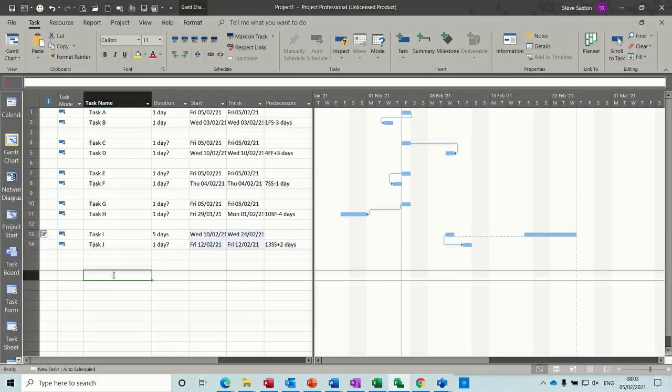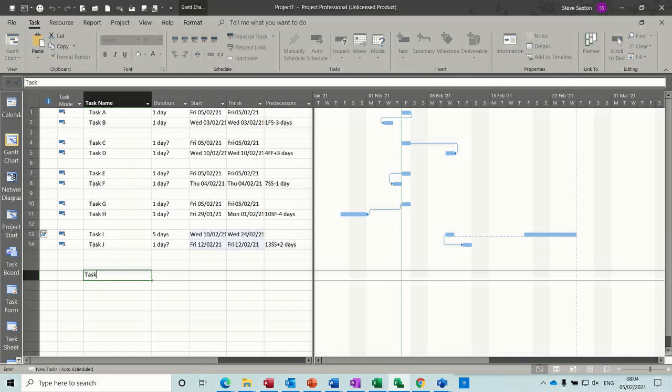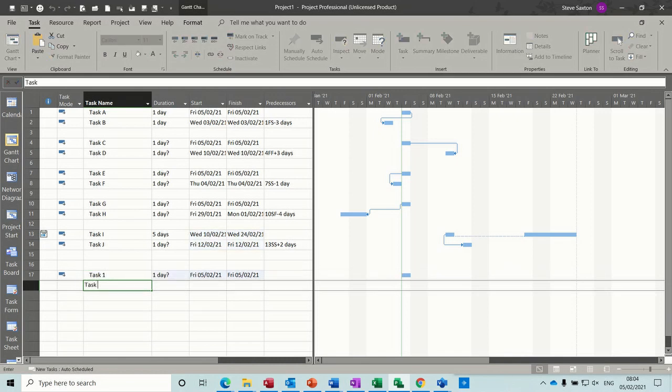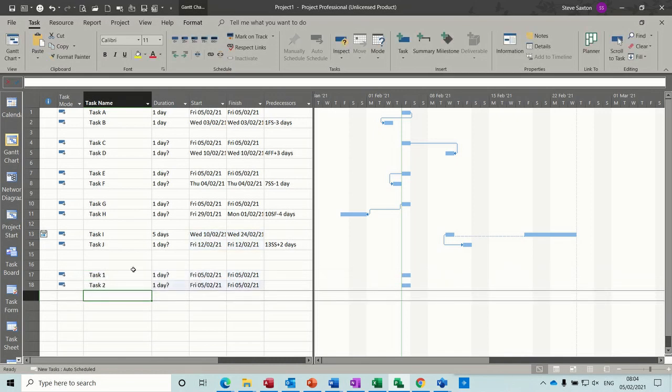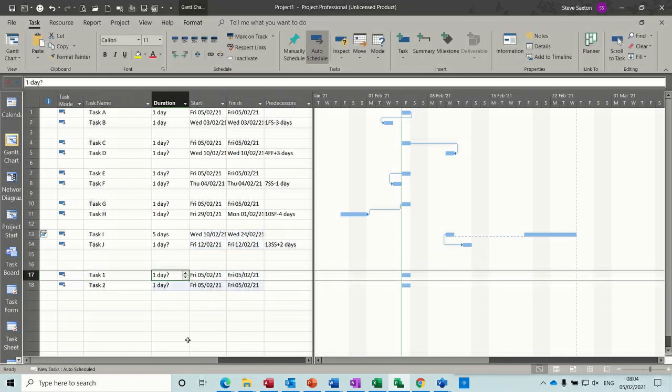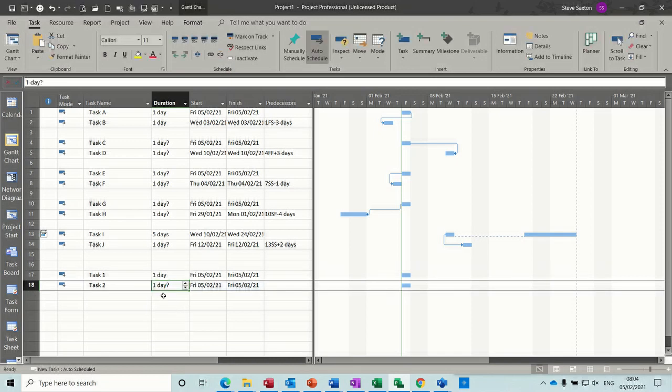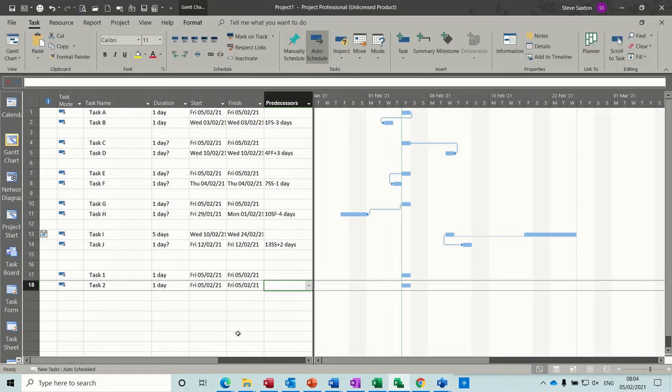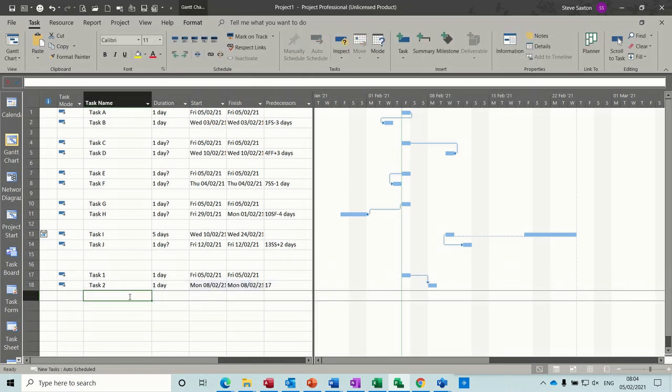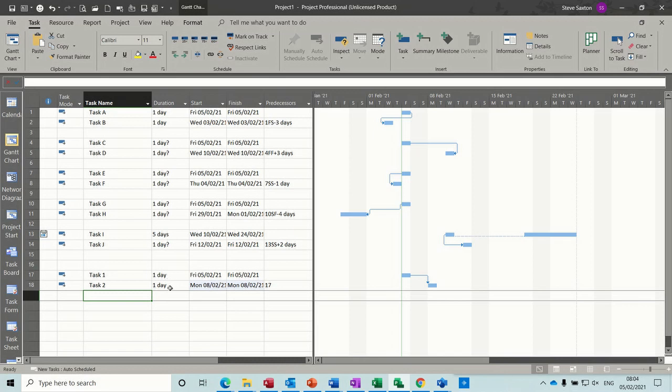Now there's a useful feature you can use lead or lag with, is to show a critical path. So sometimes, if I just go task 1, task 2, say you've got a one-day task, and then another one-day task. They're just following on. But what you need is a five-day drying time. So say that is pour wet concrete, and this one is to establish a building frame on that concrete. What you can do is do a lag on this of five days, and then it will show a critical path.